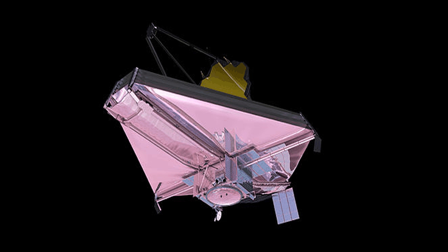In August 2019, the mechanical integration of the telescope was completed, something that was scheduled to be done 12 years before in 2007. After construction was completed, JWST underwent final tests at a Northrop Grumman factory in Redondo Beach, California. A ship carrying the telescope left California on September 26, 2021, passed through the Panama Canal, and arrived in French Guiana on October 12, 2021.